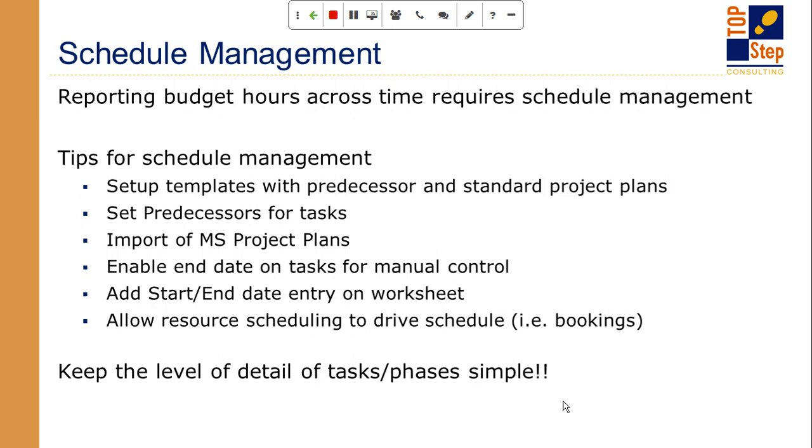From a task schedule perspective, you can look at it similar to a Microsoft project plan, where you're doing phases and tasks, giving a start and end time to each of those tasks. Then you build dependencies between tasks so that if one task slips, the other task also slips, and it's a ripple effect all the way through. That's what I immediately think about when I think about scheduling.